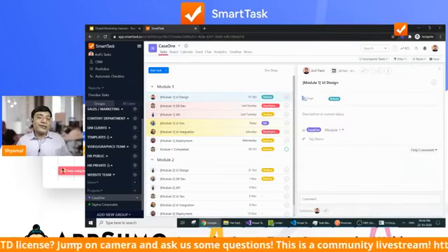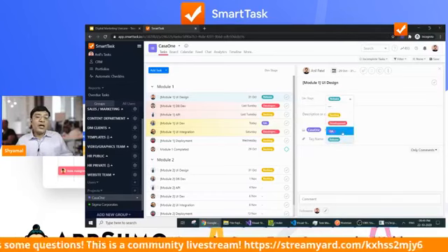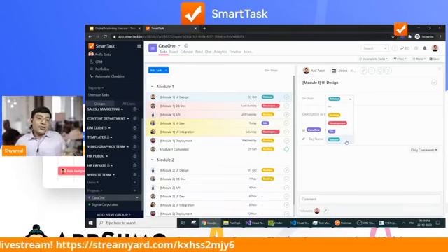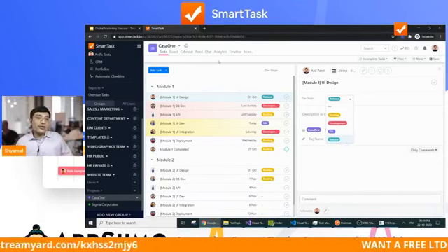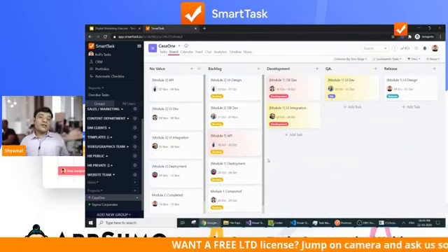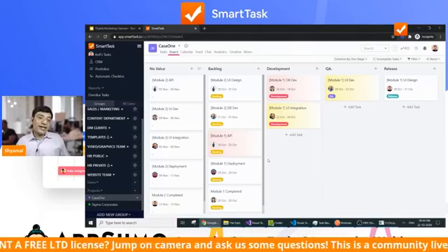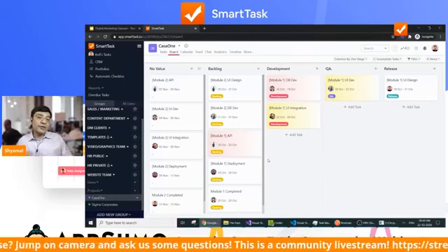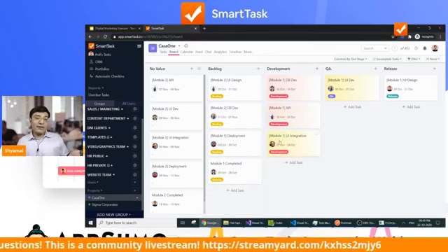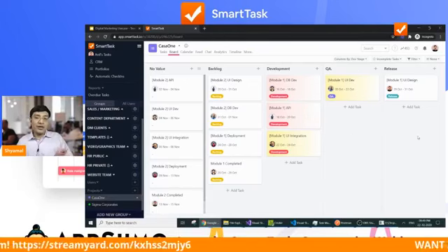So this is typically your developer who has the stages, which is backlog, development, QA, and release. Now this is also utilized in the agile board. So I will just shift to the board view. So typically developers, what they do is they follow sprint kind of a methodology. So every week they figure out a task to be worked on for this week. They move it to the backlog, and slowly and steadily each and every task will move forward. By end of the week, you have some tasks in a QA or release section.